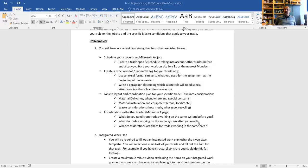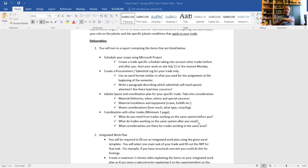The next thing you need to do is a job site layout and coordination plan for your trade. Consider material deliveries — when and where — special concerns, material installation and equipment, and waste considerations. Some of you may have an interior trade, so you may be doing an interior job site layout and coordination plan. For example, if you're a mechanical contractor, you might need to leave out a section of windows to get materials and trash in and out.